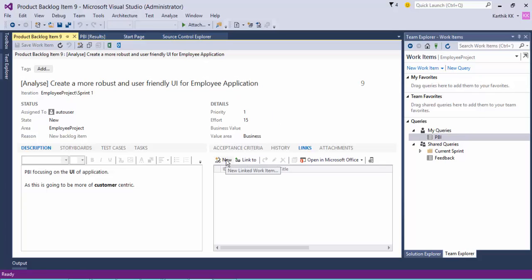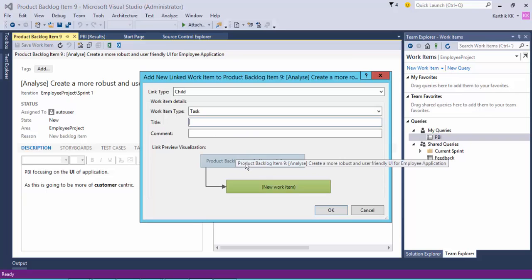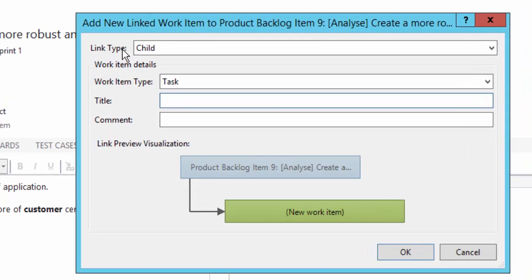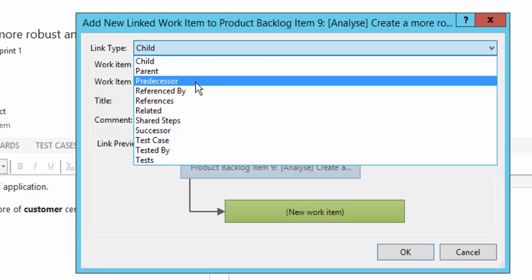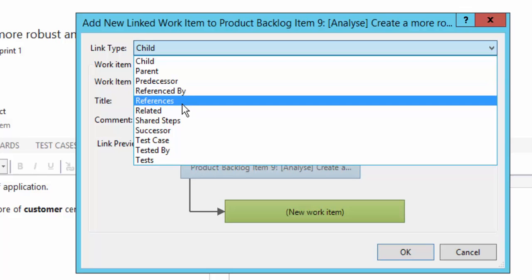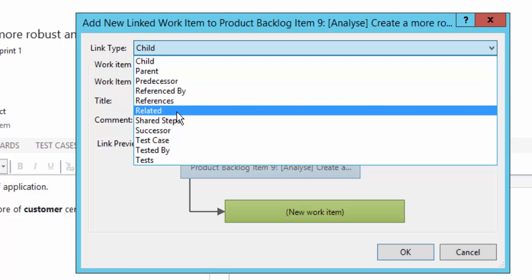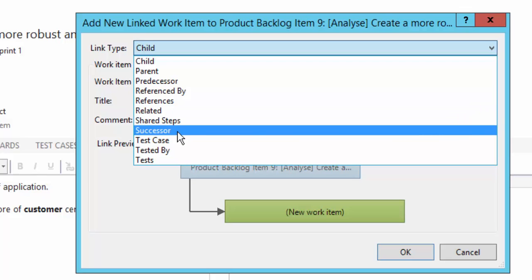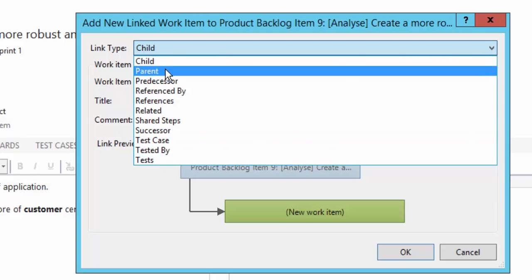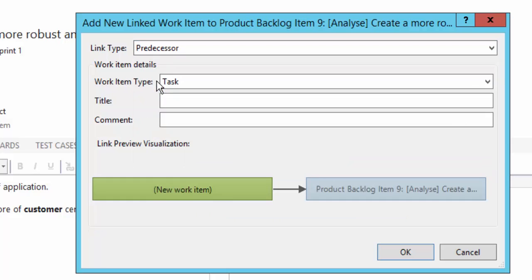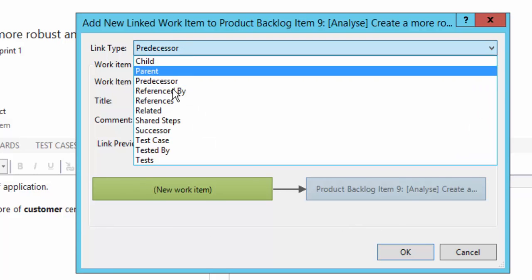I'm going to click 'New Linked Work Item.' If I click this it will show a different window. It will ask for a link type — is it a child or a parent of this PBI? Is it a predecessor, referenced by another PBI, related to another task, shared steps, a successor, a test case, or tested by? There are a lot of link type options available, and you can see that the pictorial preview visualization changes based on the option you select.